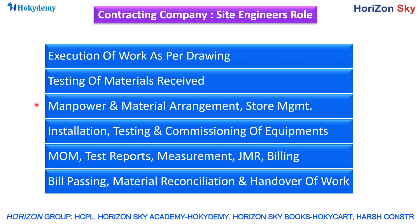The site engineer also needs to coordinate with store managers to plan different materials needed on site. For example, if work runs until midnight, the purchase team will already have left by noon as they work the corporate side. It is therefore the site engineer's role to arrange required materials in advance.